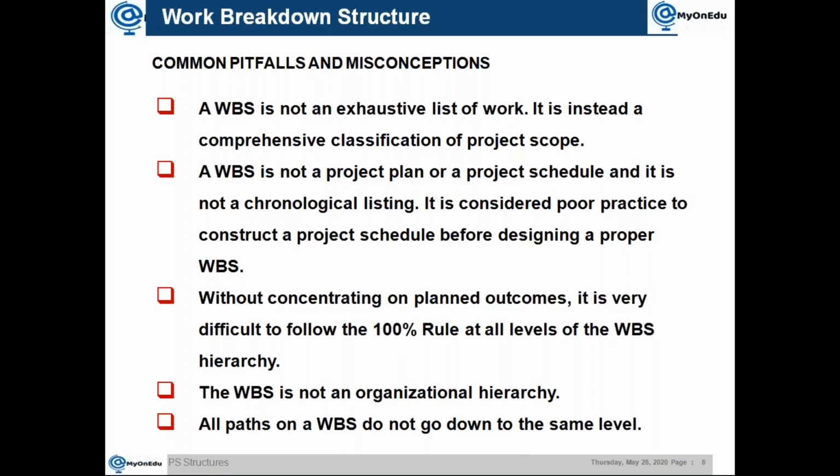So for example, in your project there are 3 departments working, and you don't need to create 3 WBS only. This is a civil department, electrical department. No, it's not an organizational tree structure for this one. Always WBS needs to be considered from the project perspective and from the execution perspective. So that is how it should be considered. Execution, and after execution, what you are going to achieve from it.